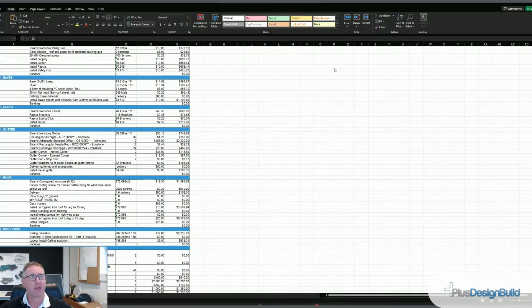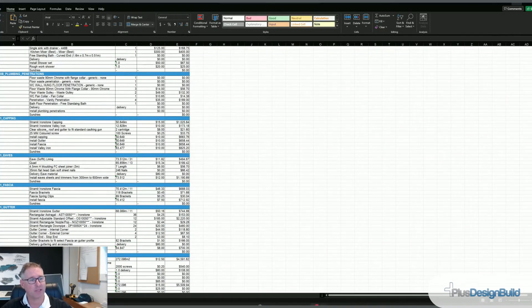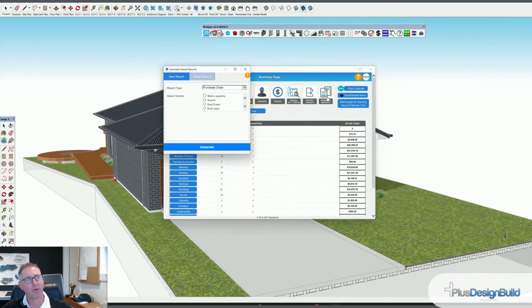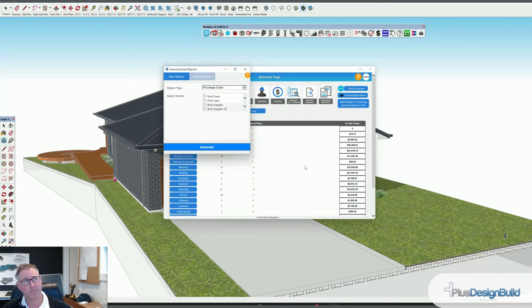There's one other really important thing to do — what about your purchase orders for your subcontractors? Just as the client wants to keep you to the price you've given them, you also want to keep your subcontractors to the price you've agreed upon. So let's go back and have a look. Generating reports — you can see I've got Watt's Carpentry and all of my subcontractors associated inside the estimate in Plus Design Build. I've also got suppliers as well.